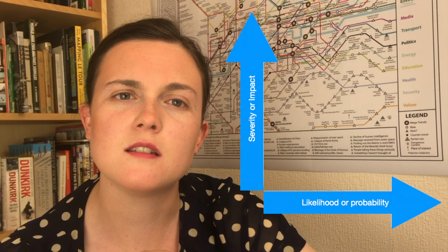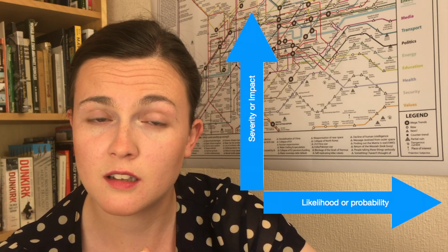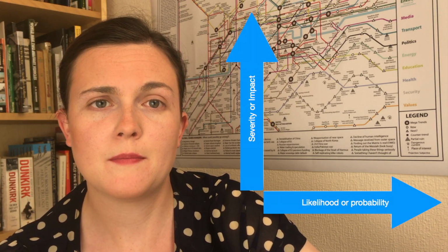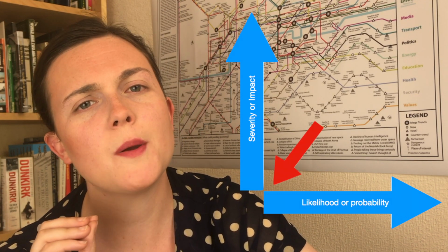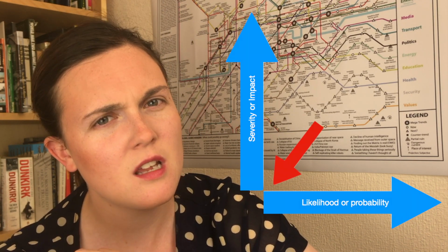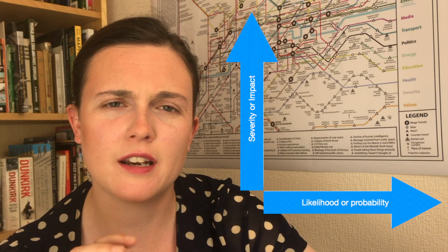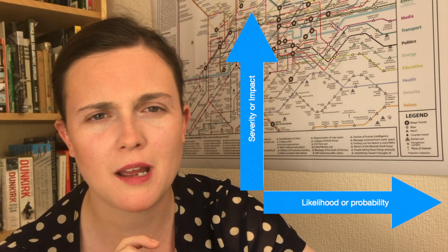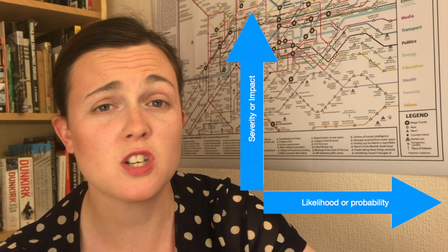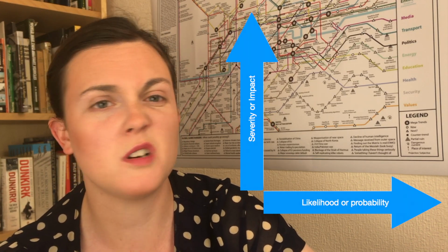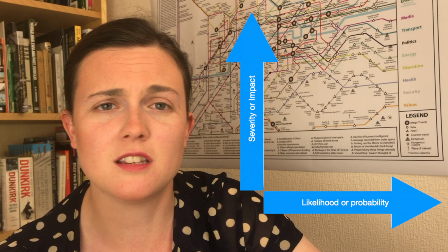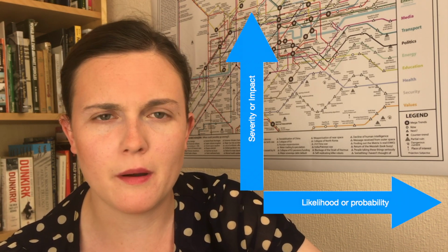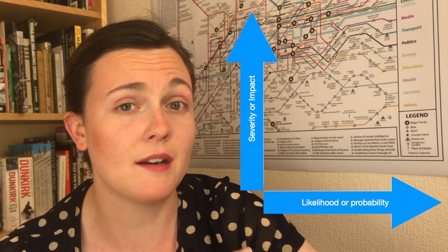This then means you can categorize the risk. So in the bottom corner, you have the highly unlikely risks that are also a low impact. So things which are barely ever going to happen, and if they do, not much will happen. You may decide to actually ignore them. If anything goes in that corner, you may say, look, we're not adding that on the register. It's not worth the time managing them. That gets offset by any positives you may get by managing them.